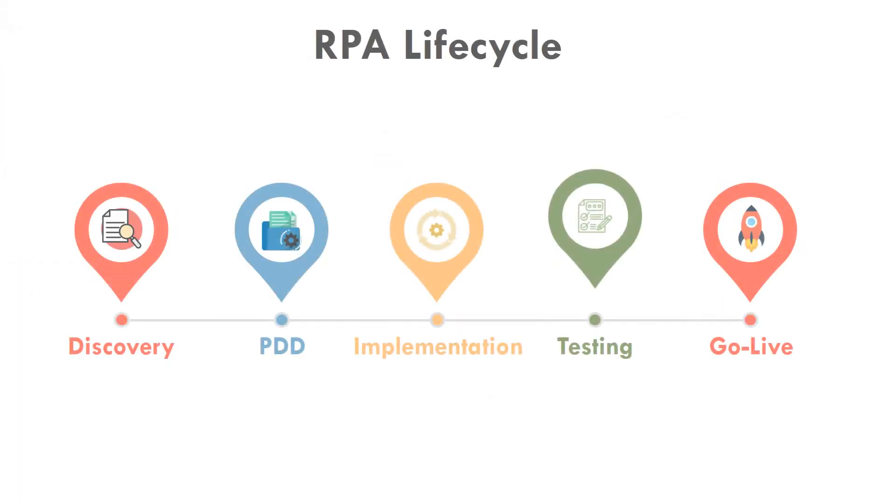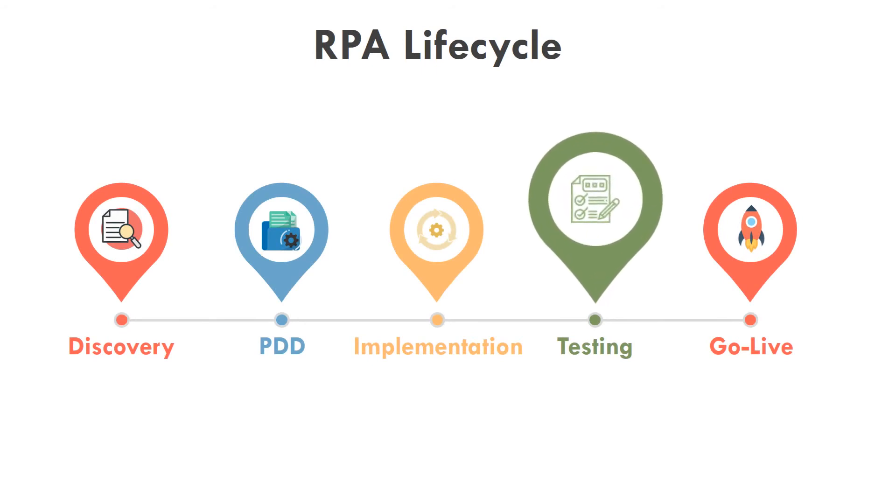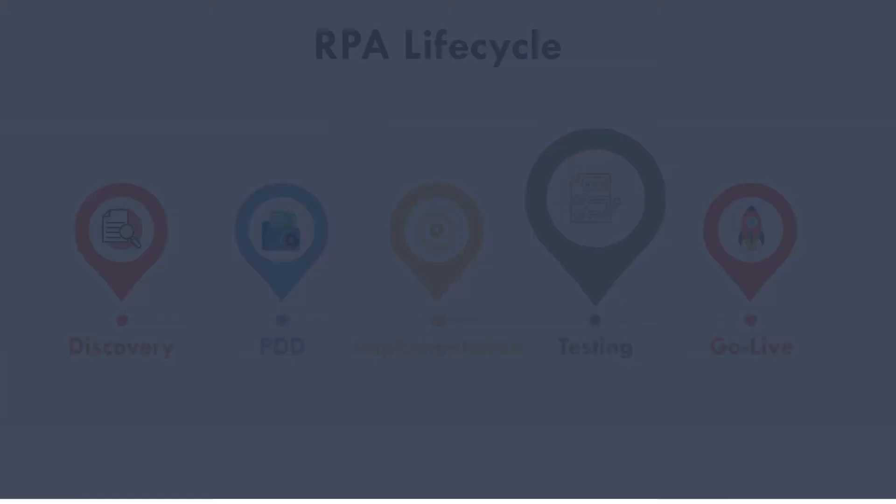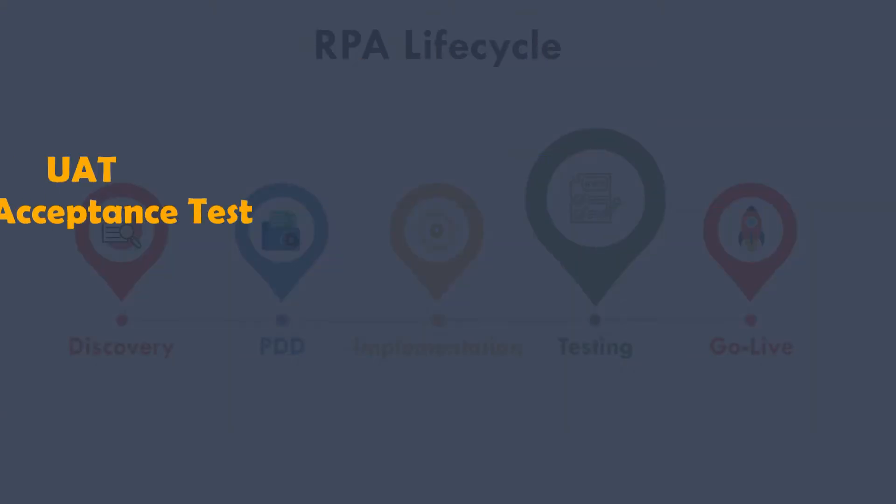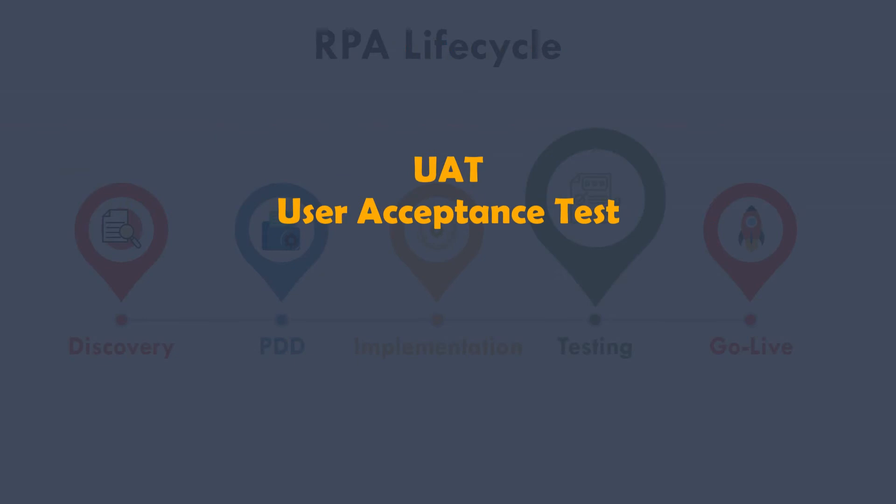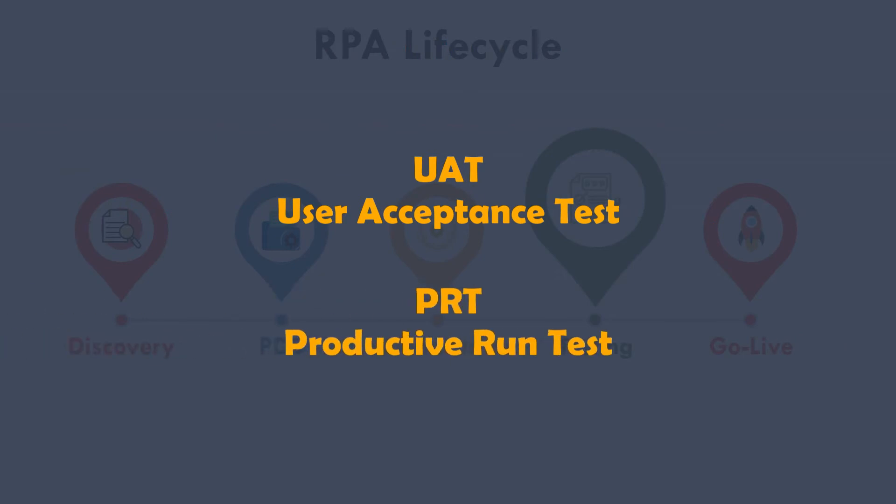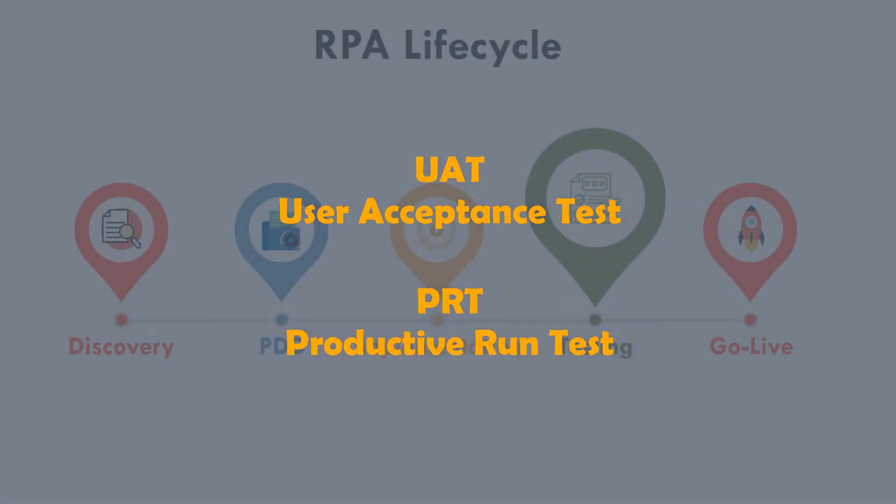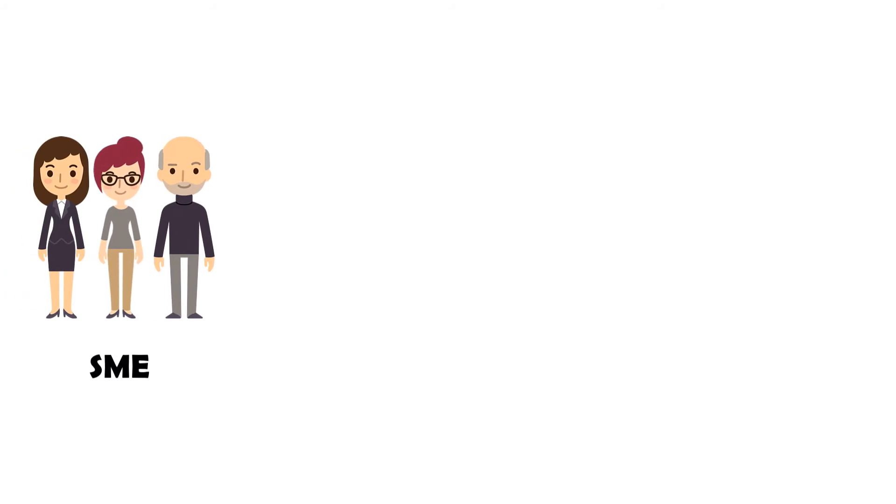Testing phase takes place after implementation. Two tests should be carried out here. First UAT, User Acceptance Test, and then PRT, Productive Run Test. Testing is intended for the department to check that the bot is delivering correct results, before the bot goes live.